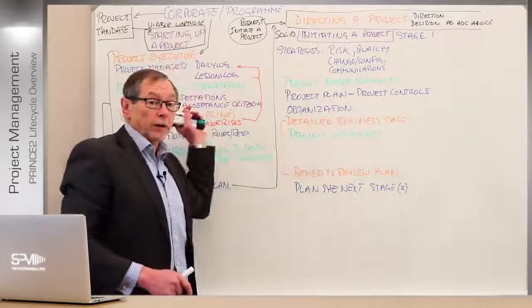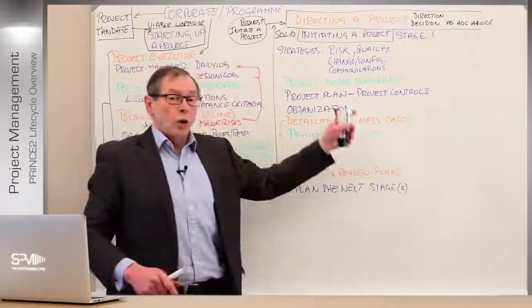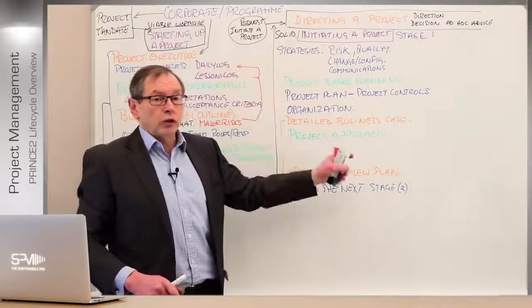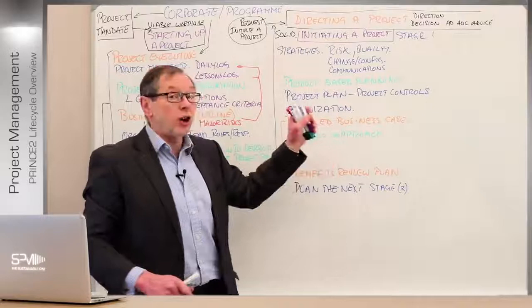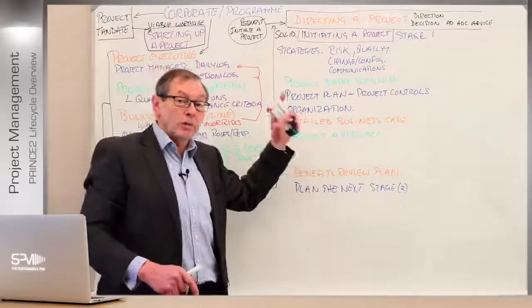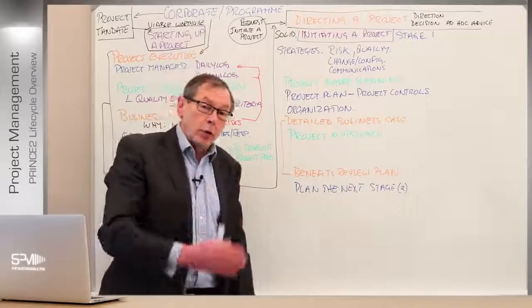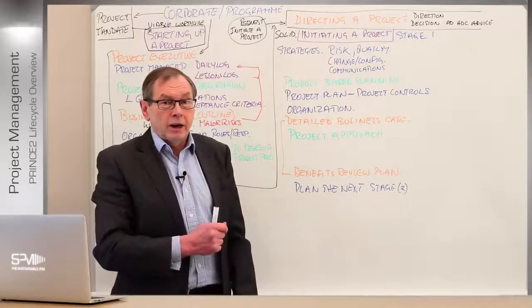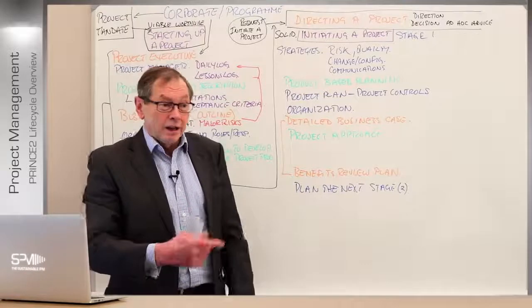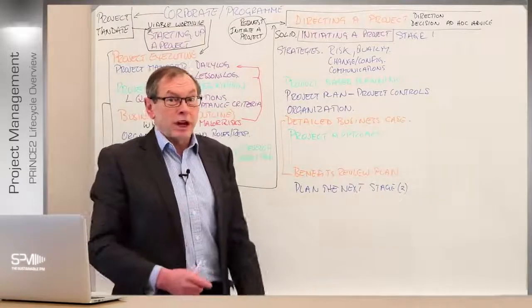Decide here, define over here, decide here what we're going to do, right? And put some pen and paper and get it down and get it signed off. Baseline it at this point, baseline your document, say this is an agreed state at this point in time. Right? I stress that because it's very important, because the very next day things may well have changed.